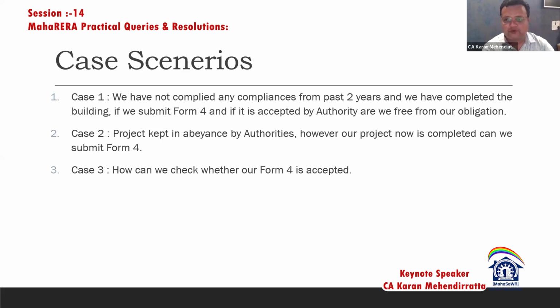Even though your form 4 is accepted, if you have not completed any compliances, you are bound to complete the compliances. As per the act, you are bound to update all the quarterly updates. So form 4 acceptance will not free the promoter from his obligations. He can get the penalties of non-compliances from the authority for the project.